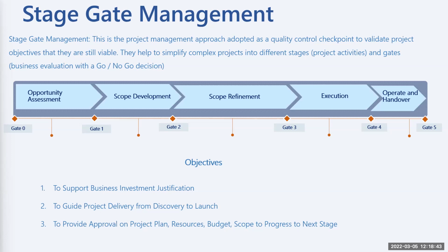And passing through a gate means that there's a checkpoint of certain things that have been agreed that need to be done at that initial stage. If that has been done, we can progress to the next phase. But in terms of the deliverables that need to be delivered, it's not something you would worry too much about because it would have been laid out in your governance framework. And you can always ask the senior stakeholders or the SMEs to guide you in terms of the deliverables.